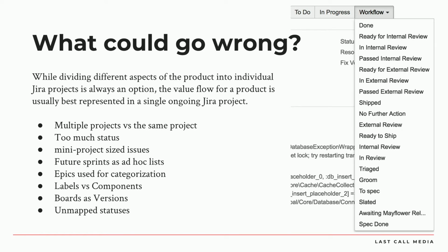You can go to the issue search area of Jira, configure a query and save it, and then create a board that uses that query. If you add ranking to the order by, and Jira in the board config will give you an easy button to add ranking, that's what lets you drag and drop the order of the issues. So we'll look at that.